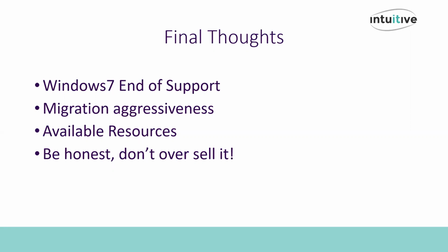Migration aggressiveness: consider factors like how many computers need to be migrated, how many applications need to be tested and ready, what the rollout plan is, whether the environment has freeze periods, whether the deployment is taking place during or after business hours or on the weekends, when the migration will start, and how many departments or endpoints are getting migrated in each wave.